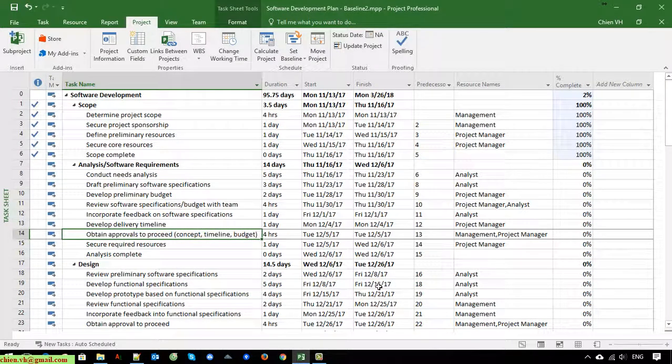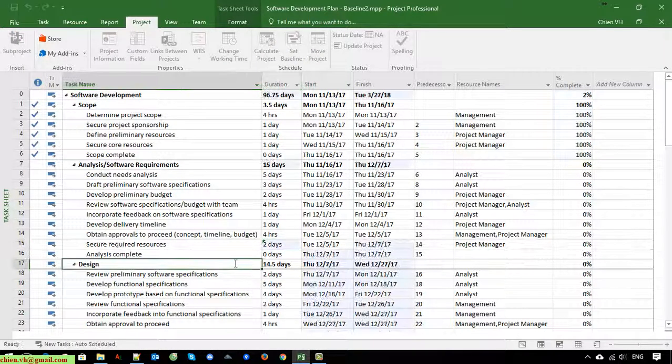to do some modification to make the finish date impacted. So now, for example, I will increase this task from 1 day to 2 days. Yeah, so you can see here the finish date will be increased by one more day. The first time it is 26 and now it is 27.